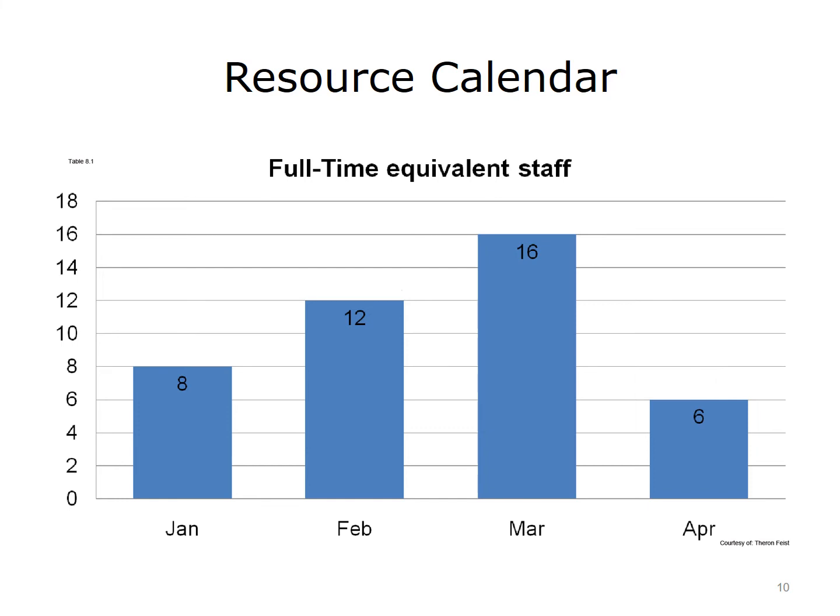A resource calendar is useful to frontline managers, such as nursing managers, to understand when and how much staff will be needed to backfill for the nursing personnel that will be working on the project. Many times, administrative time is used for project needs, but if the nurse on the project is needed more than they have administrative time, then the nurse manager will need to backfill for that person. This is also an additional cost to the project for that person's time.